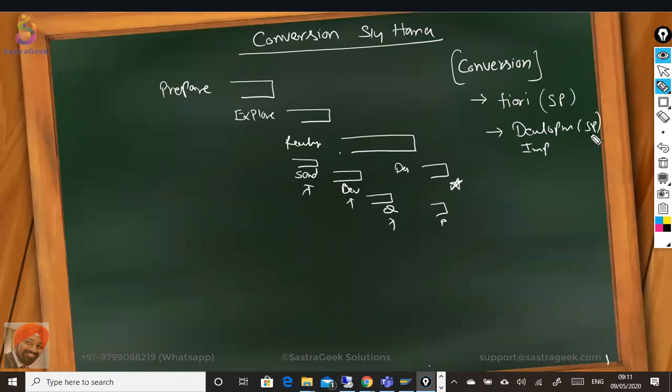And then the company, which is dedicated to Agile, said that the first motive is just to move to conversion. We were also able to do the conversion in 5 to 6 months, where the first sprint was only dedicated to converting the system to S4HANA. No other improvements, no Fiori applications, no advanced functionality which comes with S4HANA, no additional developments. Although those were all in the scope, they were put in separate sprints.